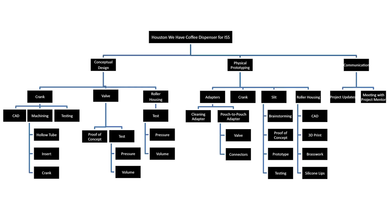This is an example of a work breakdown structure for Houston We Have Coffee. The team divided their project into three main design blocks: conceptual design, physical prototyping, and communication. Within each of these design blocks, they further subdivided into individual tasks.